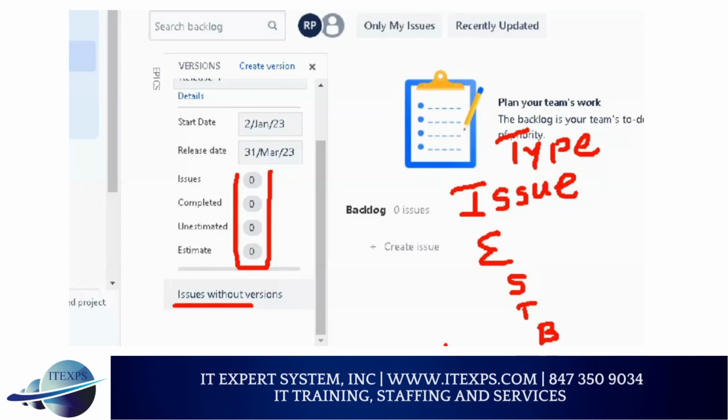Now, if you want to create a spike, that's another kind of story, which I will cover next. Spike is also considered a story, but has 0 points. Speak with me. 0 points, because there is no commitment, because it's just research. So the output is not helping the customer. You are not really delivering it. Ideally, you should do a demo and all, but you're not giving it to customers. So a spike is considered a 0 point story. Make sense? We are done with the release.